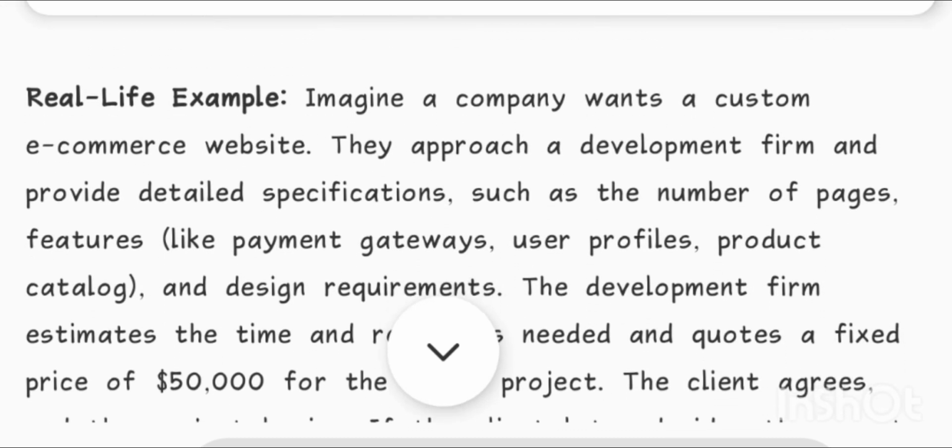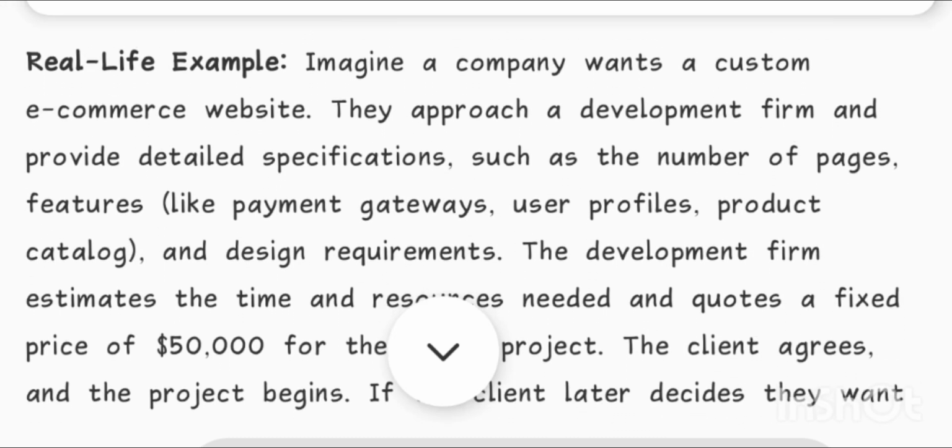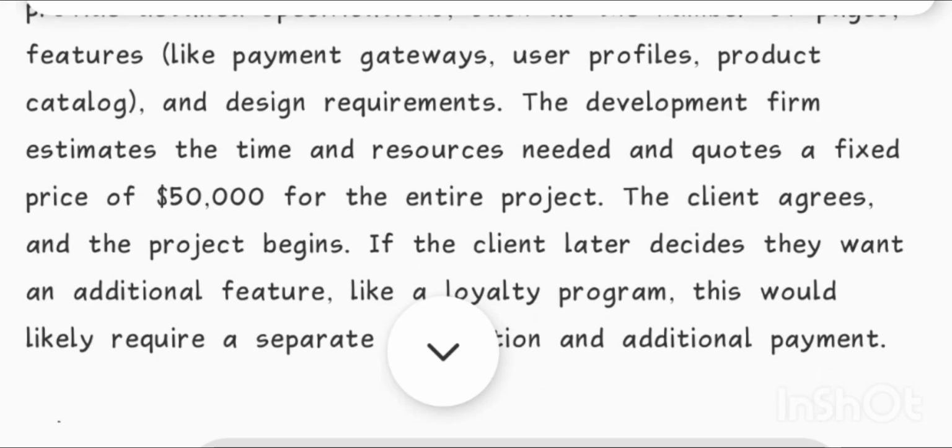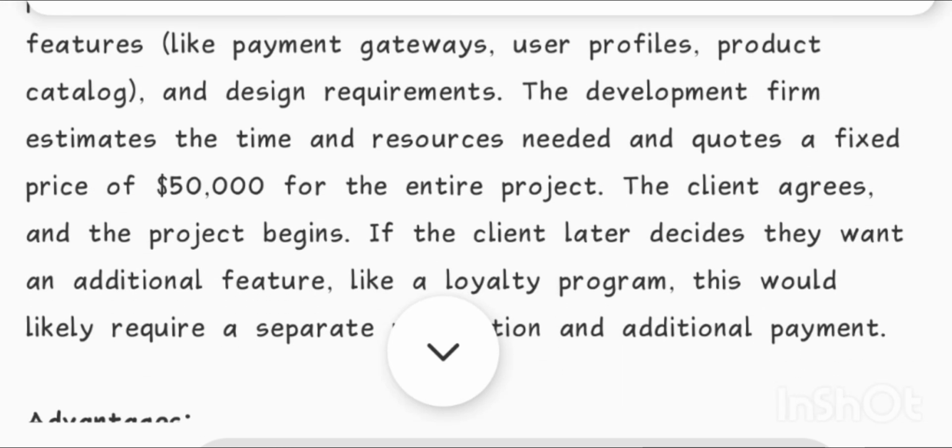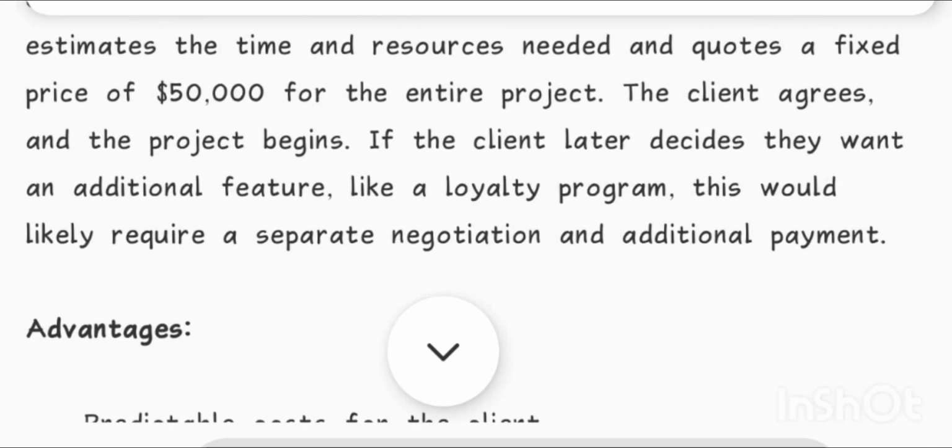Real life example. Imagine a company wants a custom e-commerce website. They approach a development firm and provide detailed specifications, such as the number of pages, features like payment gateways, user profiles, product catalog, and design requirements. The development firm estimates the time and resources needed and quotes a fixed price of $50,000 for the entire project. The client agrees, and the project begins.